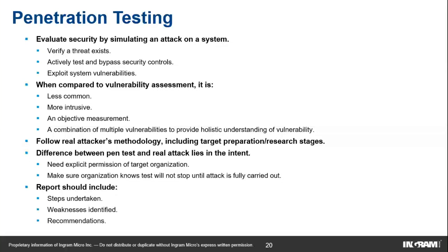So this will actually follow a real attacker's methodology. So be prepared for any downtime. Always, as part of a project plan, as I explained earlier, when penetration testing is done, it is an intrusive test, and it can bring down your server. You need to have the guys ready to bring it up again, so that it is available and tested properly. And always back up before a penetration test where possible.